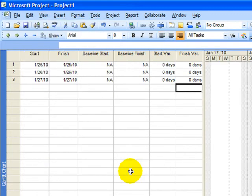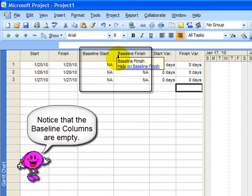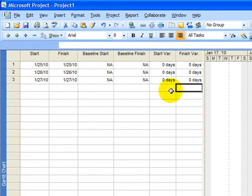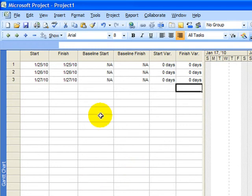The Variance table shows you start and finish, baseline start, baseline finish, and will calculate a start variance and a finish variance, indicating whether things started earlier or later than expected, things finished earlier or later than expected. But there's no way you will ever get any statistics on your three tasks unless you save a baseline.